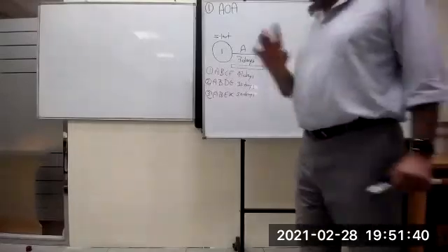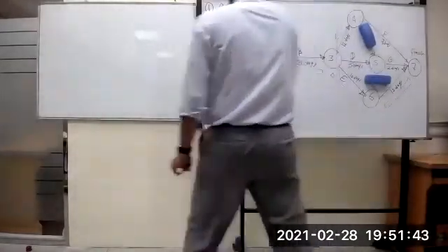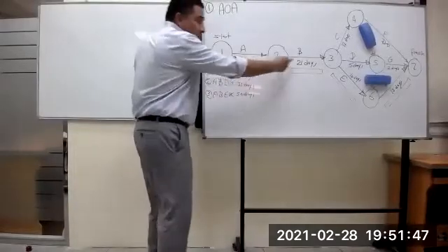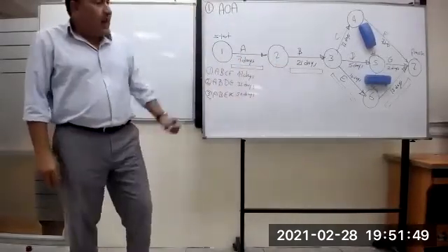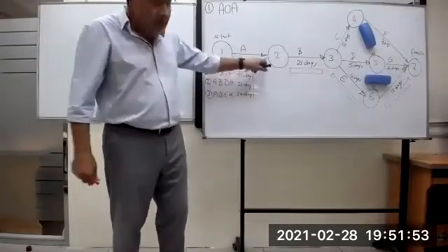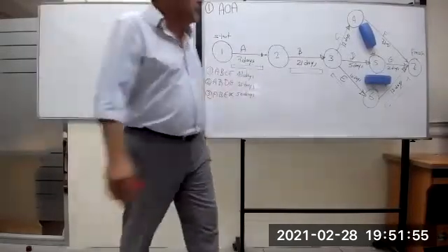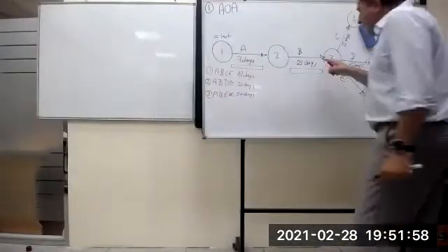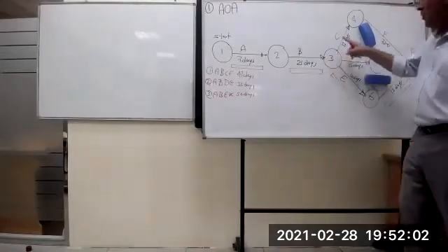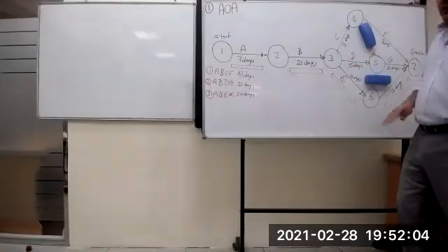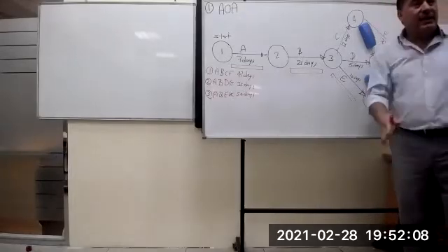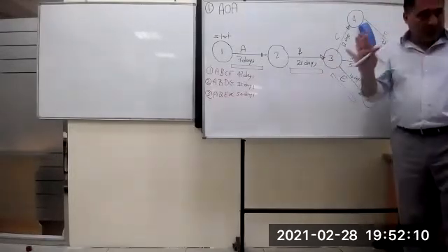Assume. Okay. What does it mean when activity A has a successor? Does activity A have a successor or not? It means activity B cannot start until A finishes. We discussed this right now. Here, activity B finishes. So how many activities will start? 1, 2, 3. All the successors will start at the same time, once this one finishes.